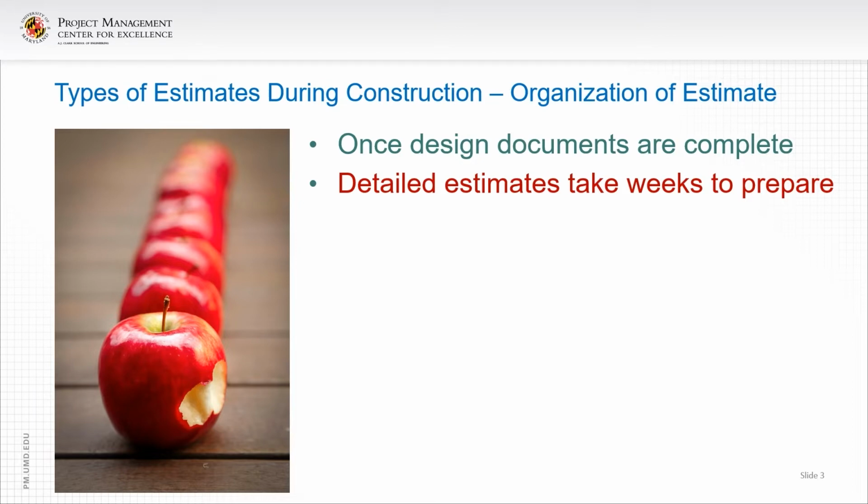Productivity is very important. The estimator must, in essence, build the project on paper. Hypothetical methods of construction, logistics of the site with its constraints for storage and maneuverability, and site space for subcontractors are important, including delivery strategies and the schedule of activities. All must be understood before a realistic price can be assembled.